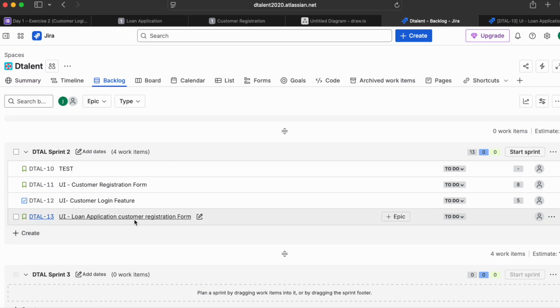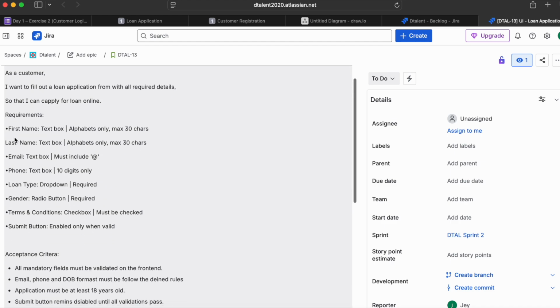So tell it one by one, and document here one by one all the validations, so that way it's easy for the estimation too. Okay, so this user story would take 3 to 5 points, medium complexity. So we will go with 5 for this user story.